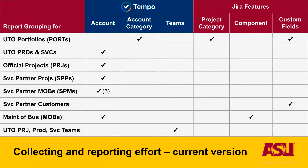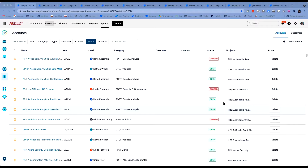We have portfolios now, which aggregate projects, products, and services around business needs. These days in version 4, all JIRA projects at the UTO should either belong to a project, a product, a service, or an umbrella aggregate like a portfolio. Because our organization has standardized these templates, our data can now roll all the way up to leadership in a very simplified manner, regardless of the type of work being done. Now we're going to do some demos.